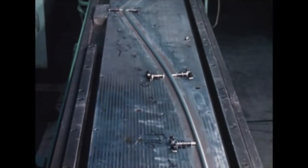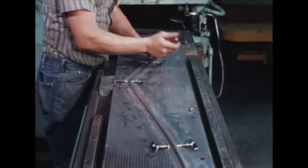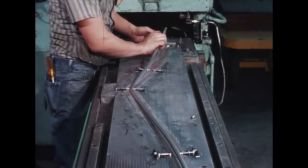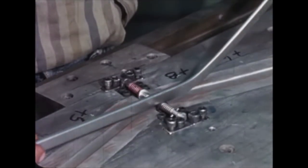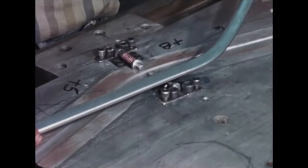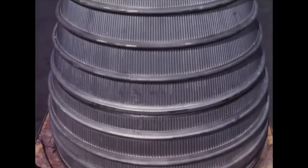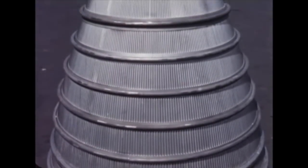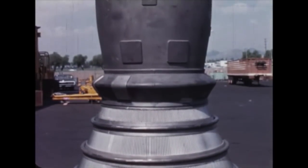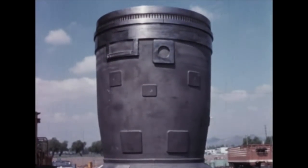Initial evaluation was concerned with dimensional integrity of the die, precision repeatability, and durability of the mold. Integrity and repeatability were very satisfactory. Durability, however, was not satisfactory, as wear was noted at the die throat after forming of the first 300 tubes. The first thrust chamber to be fabricated from tubes formed by this process had completed both furnace braze cycles as the quarter ended. It was then shipped to Neosho for completion. Durability of the die will continue to be evaluated during forming of tubes for a second thrust chamber.